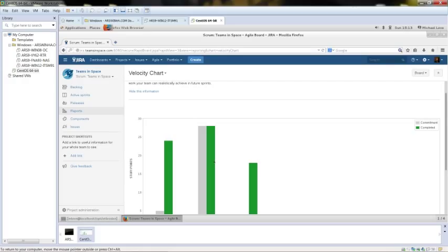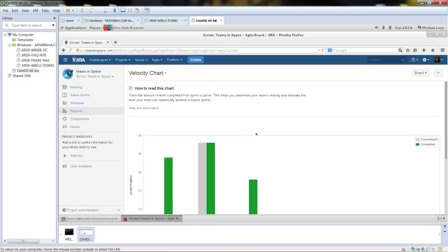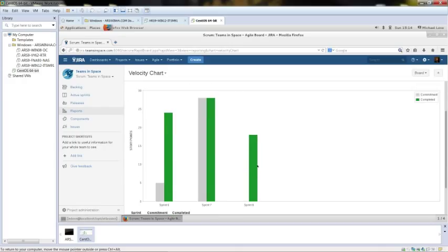So if we backtrack again to the backlog, we can see that teams start by creating epics, which are then broken down into issues which individuals can work on. Teams begin with multiple epics, which are usually features that need to be broken down into user stories or issues. Then each issue is broken down to a level where it can be accurately estimated.